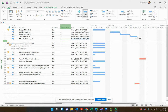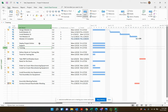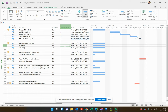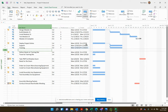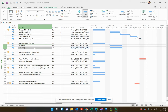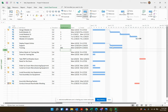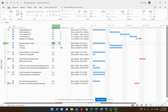Second scenario: support and training happen simultaneously but only after Project Online has been deployed. So we need support and training to start at the same time once Deploy Project Online is complete. I'll put predecessor 7 on both tasks. But since we want them to start at the same time, I'll tie training to support using '8SS' — which stands for start to start — linking the two start dates together.